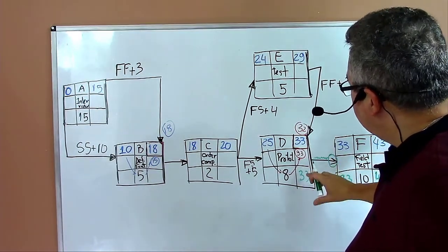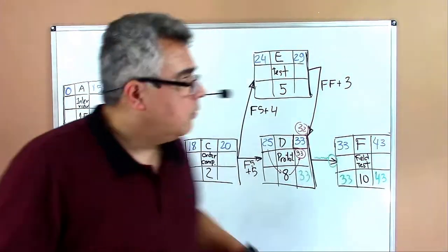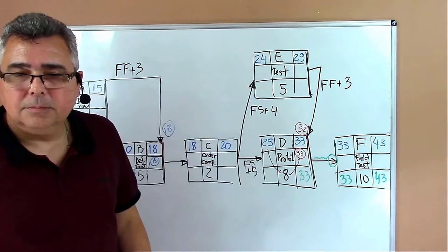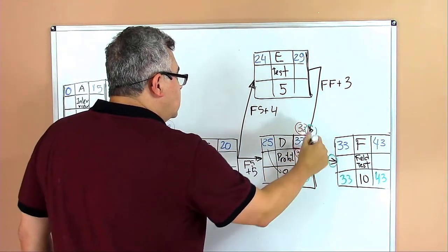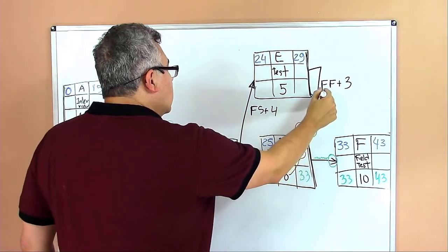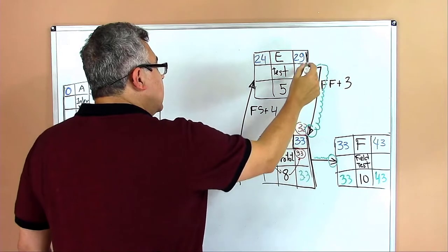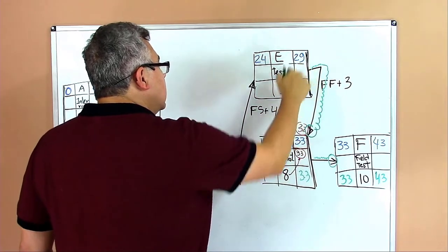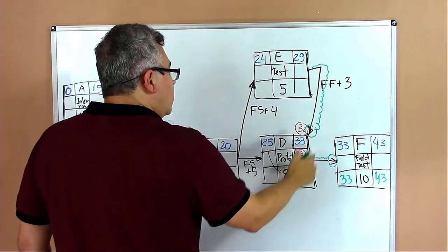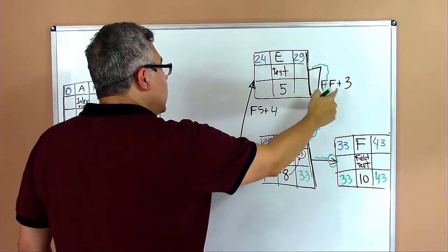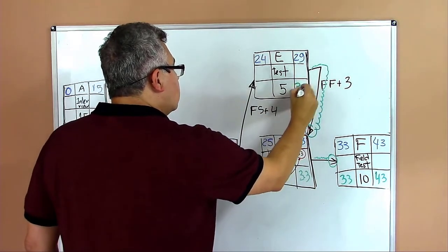And now I would ask you, what is the late finish for activity E? Again, there is the arrow pointing to the finish line. I have to walk back on the arrow here. So I have to bring that 33 back to activity E. I have a 3 days delay, but because I am walking backward, I have to subtract 3, and I go from 33 to 30.